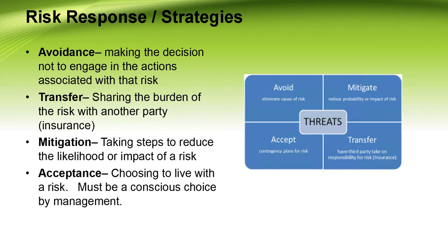Transference. A risk, or the effect of its exposure, can be transferred by moving to a hosted provider who assumes the responsibility for recovery and restoration. Alternatively, organizations can acquire insurance to cover the cost of equipment theft or data exposure.